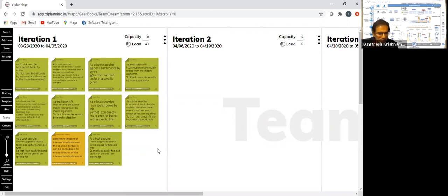But what if this is the first time the teams are coming together to deliver value? Then how do you come up with a number? You don't know your velocity because you don't have historical data. That is when you come up with capacity. Capacity is sometimes an approximation of your actual velocity.